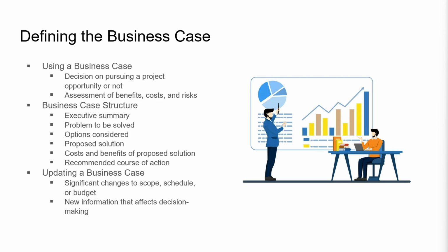A business case does not need to be considered a static document and should be updated when there are significant changes to the scope, schedule, or budget, or in the case of obtaining new information that would affect the decision-making process.